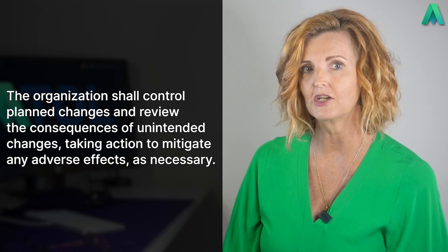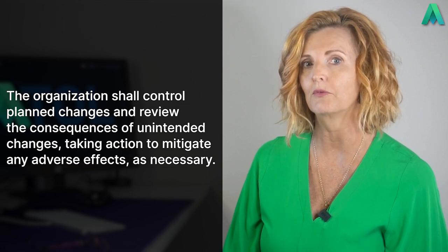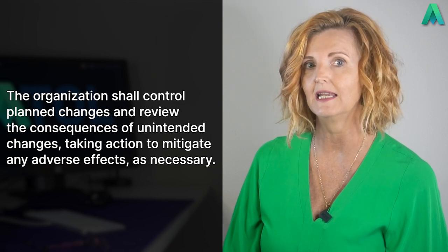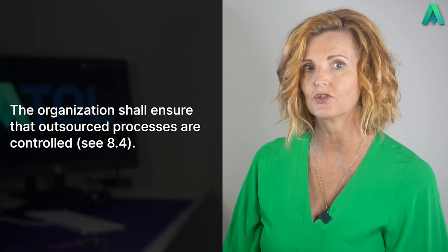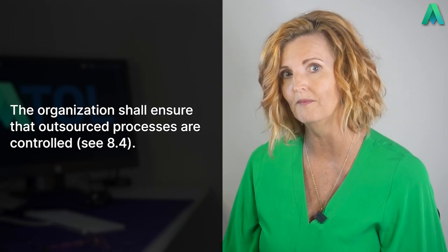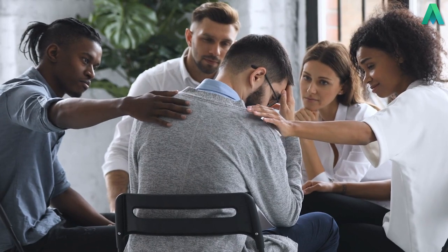This clause has a couple of final sentences. The organization shall control planned changes and review the consequences of unintended changes, taking action to mitigate any adverse effects as necessary. Things don't always go as planned — you can have a project management plan or a job pack, whatever is relevant for the type of work you're doing. But things can change: whether they are controlled changes, such as the customer requesting something different, or unintended changes, such as a non-conformance being identified.